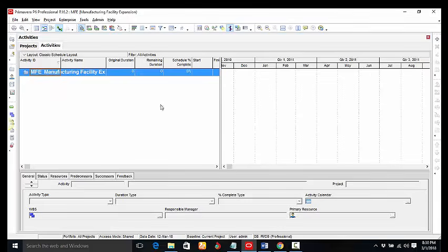So at this point, you will notice that we have the columns at this part of our P6, and then at this other part, this is where the Gantt will appear. Then at the lower portion is what we refer to as the detail view. What happens essentially in the detail view is that it gives you a detailed description of each activity or each element that you select within your timeline. And that's what the detail view helps us to do. So now that we have opened up our project, the next thing we need to do is to create a work breakdown structure.